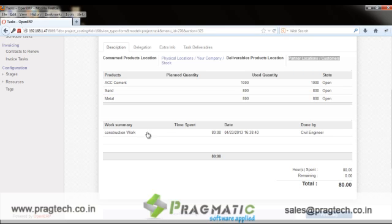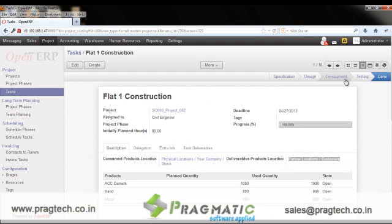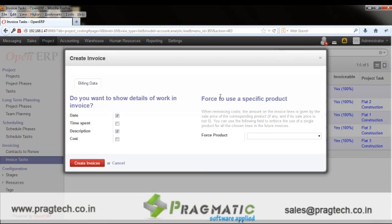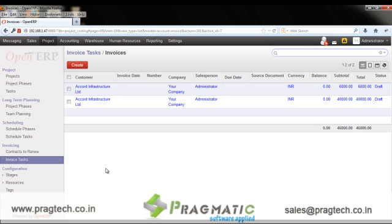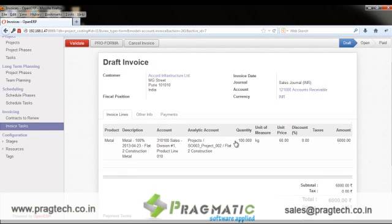The user can mention the service hours, and once the task is completed it proceeds through different stages until it is available for invoicing. The user can select a couple of tasks and create an invoice against them by clicking 'Create Invoice'. The invoices will be listed accordingly — for example, one invoice for the consumption of 100 kg of metal, and a service invoice for services rendered for a particular task.